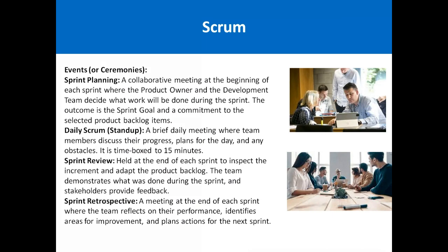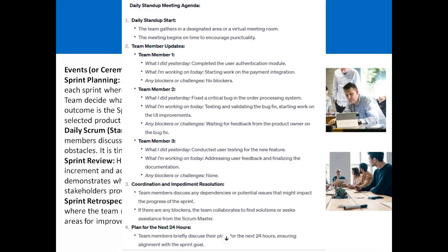Then the daily scrum or stand-up meeting is basically a 15-minute meeting in which the team members stand and discuss their plans for the day. If there are any technical issues, they will be discussed. They discuss the progress of the work.